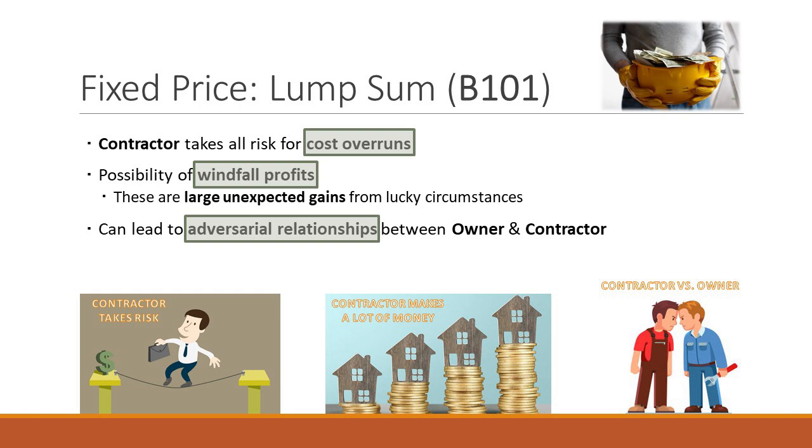Any contractor that had entered into a lump sum contract may have found themselves behind the eight ball, because when they went out to buy copper wire for running electrical work in a building, because the supply is short, the price that they anticipated on paying when they entered into the agreement went way up.